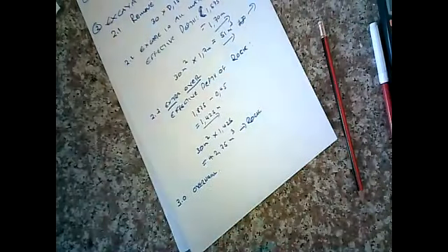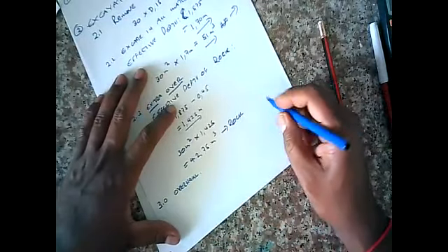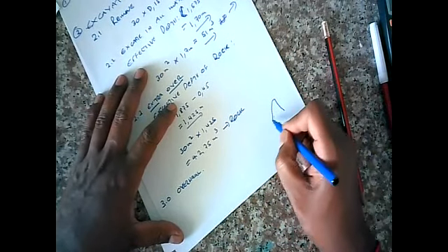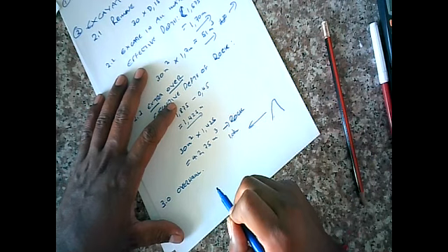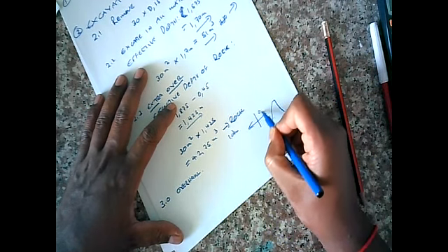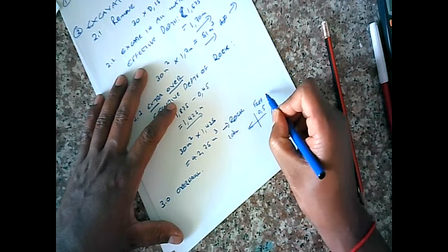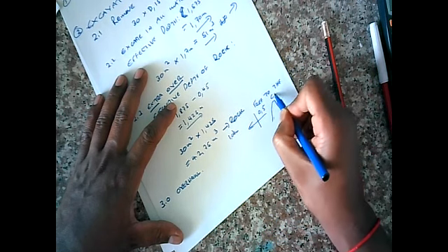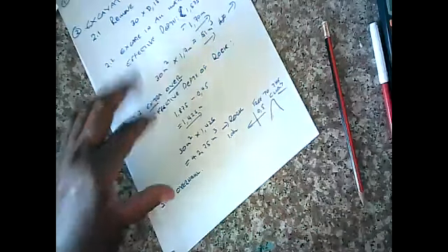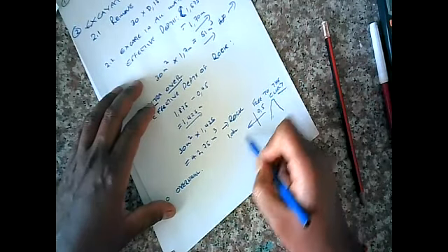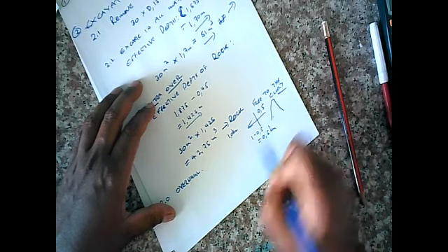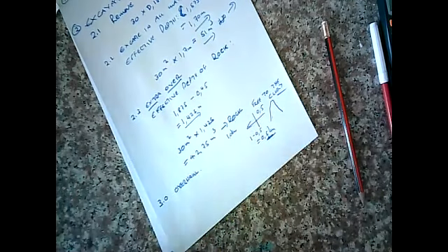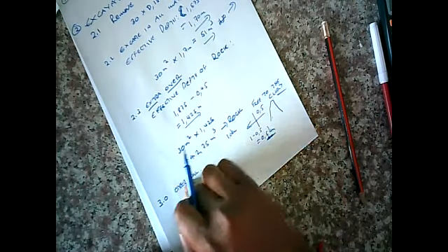If the contractor had to move all that stockpile material to a distance of 1 kilometer, the first half, 0.5, is free to the client. The client only pays for 1 minus 0.5, 0.5 kilometers. That's all he pays for. That is what overhaul is.